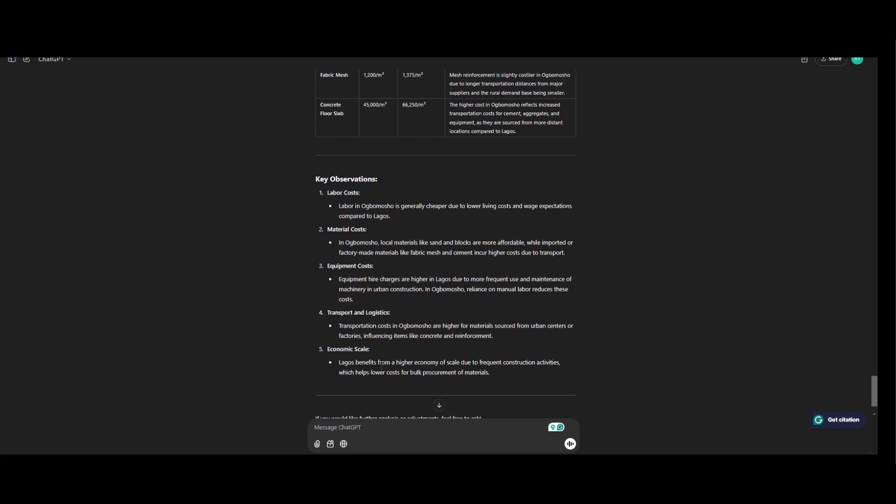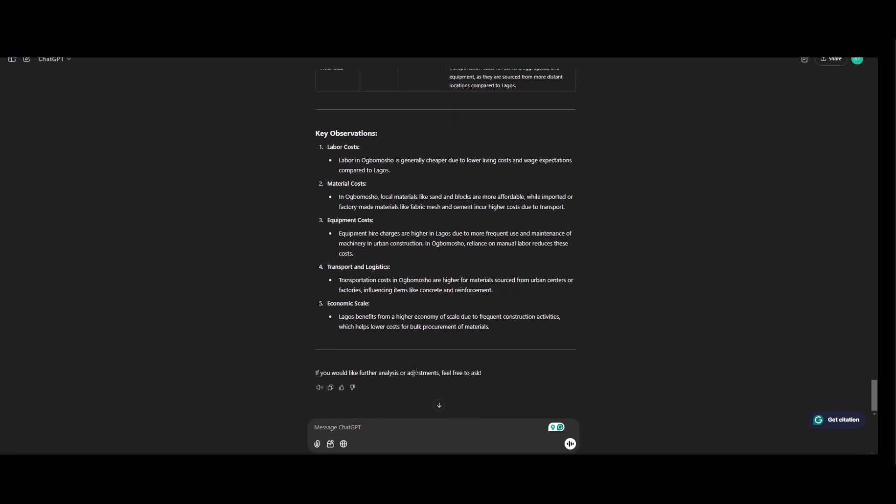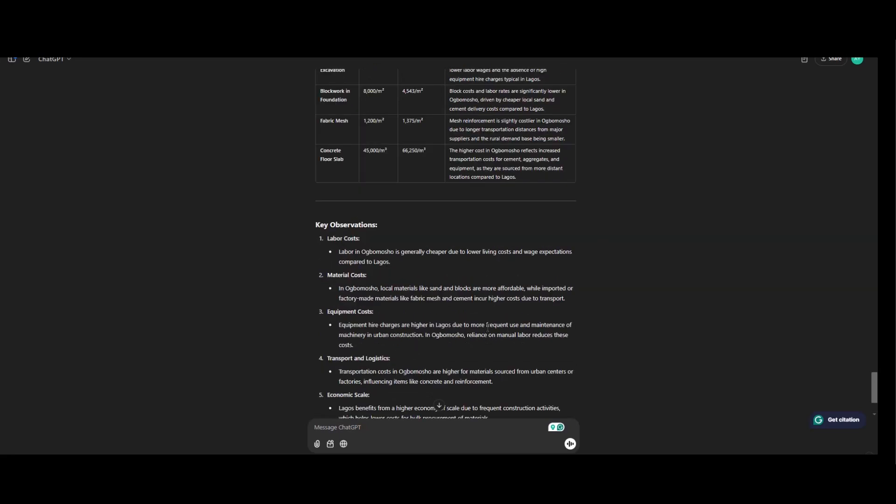Economic scale. Lagos benefits from higher economies of scale due to frequent construction activities which helps lower cost for procurement of material.